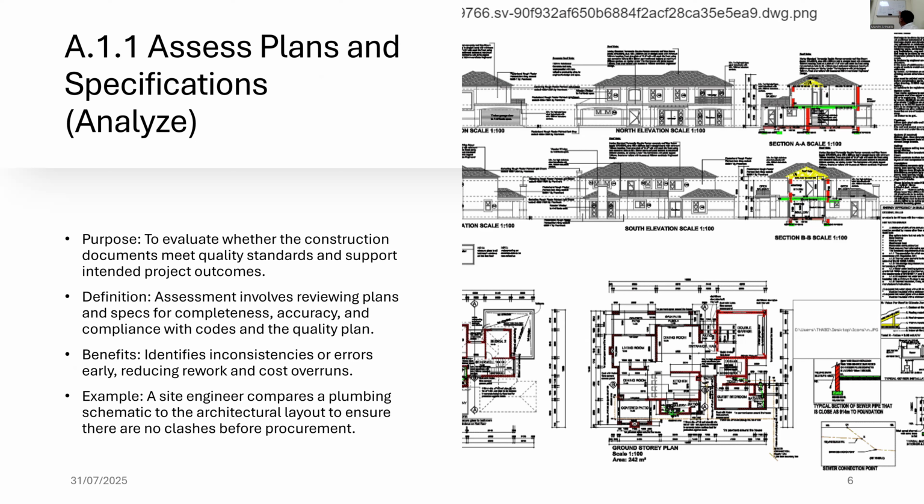The cost of rectification increases, so when we are able to determine early those design mistakes, design errors, and omissions, we can avoid rework that causes delay and cost overrun. Again, the problem, why is it happening inside NCR and everything? Simple, lack of plan. You didn't plan to do that.